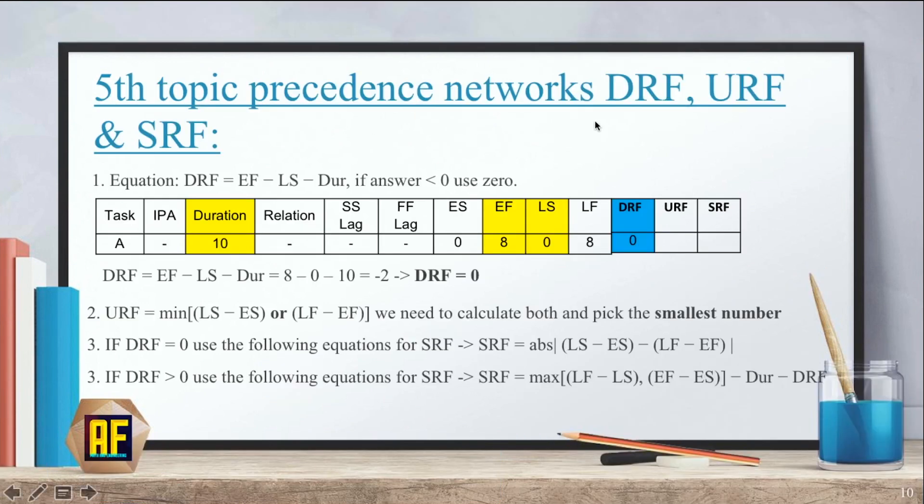Our fifth topic was the same precedence networks, only we add the DRF, URF, and SRF to the equation. And if you remember, the equation for DRF is EF minus LS minus duration. If our answer is negative, we use zero. And for our URF, we pick the minimum number of LS minus ES or LF minus EF, the smaller of these two. And if our DRF equals zero, we use this equation for SRF.